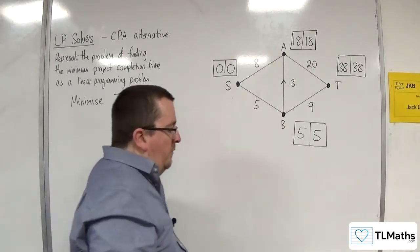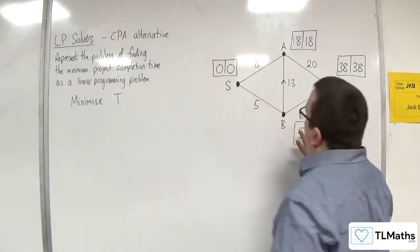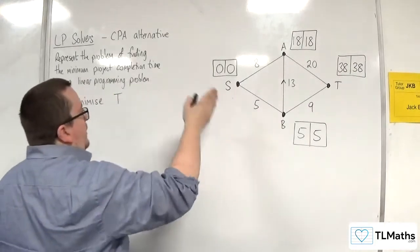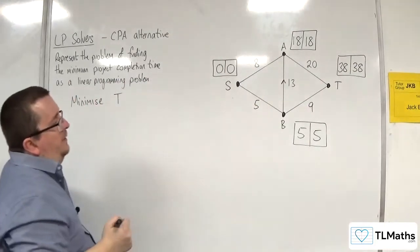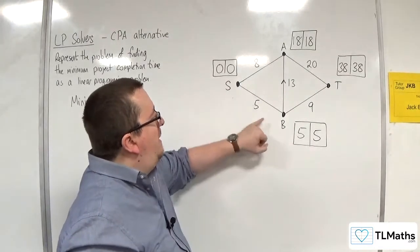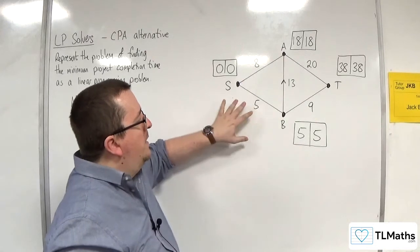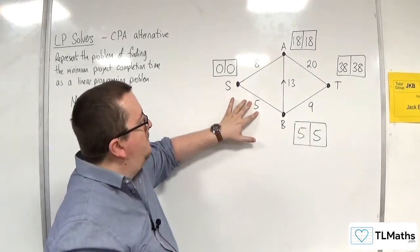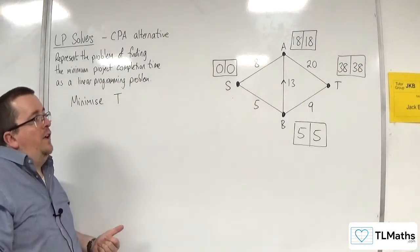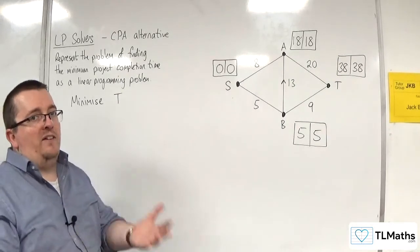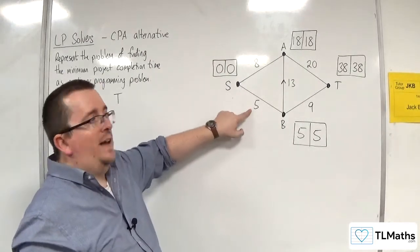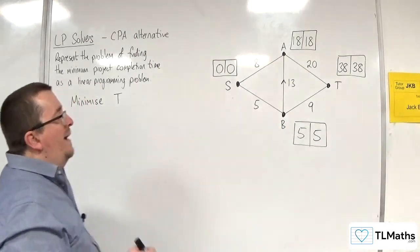Now what we do next is we kind of work our way through the network, considering each of the vertices in turn. So starting at S, let's go to B first. Now B, because of SB being 5, so that job takes 5 hours or something like that. Then we can only get to B after at least 5 hours have been completed. So at least 5 hours need to have been completed in order to achieve that job there. So the value at B...